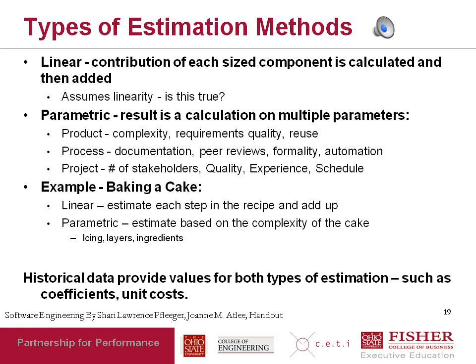The question, of course, in this is, can you assume linearity? So do you simply add all the individual estimates up, or do you maybe add the first and second use cases up, but then when you do the third use case, you multiply it by a factor that factors in the complexity of adding a third use case when the first two have already been implemented, things like that. But anyway, all these techniques where the problem is broken up into its individual parts, the individual parts are estimated, and then the total is found from the individual estimates, that's known as linear estimation.